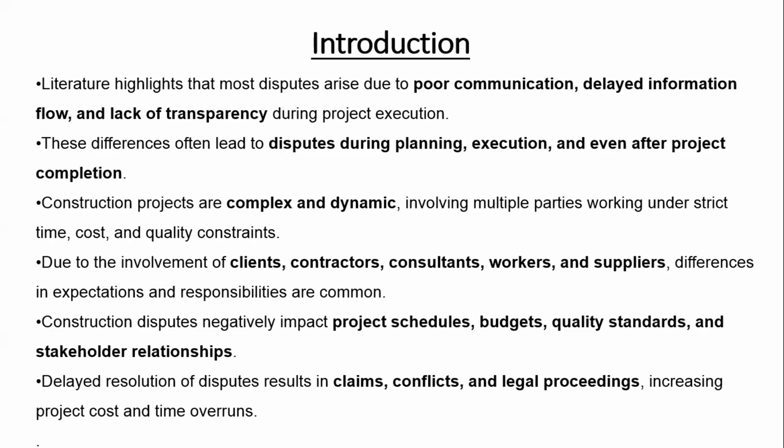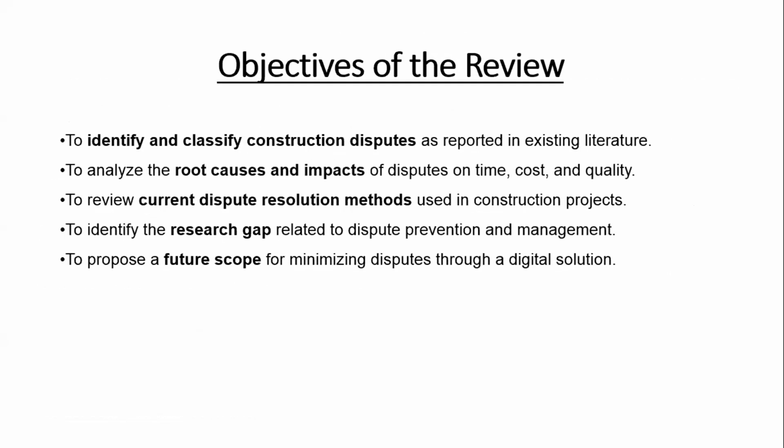Construction disputes negatively impact project schedules, budgets, quality standards, and stakeholders' relationships. And because of this, delayed resolution of disputes results in claims, conflicts, and legal proceedings, increasing project cost and time overrun. Next up, we have objectives of the review.